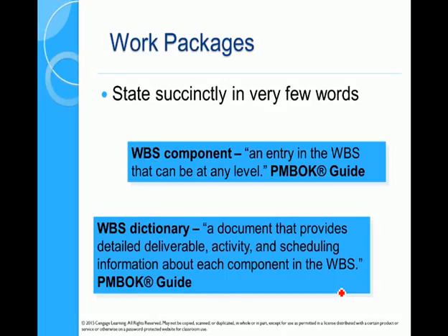Are there any activities? So you can further break down work packages into activities. Are there any activities to be completed? When will the work be done? Who's doing the work? How much should this cost? What materials are required? Are there risks involved? What are our mitigation plans? Everything about control, all the 10 knowledge areas are lumped into each work package. And then you can control work packages.